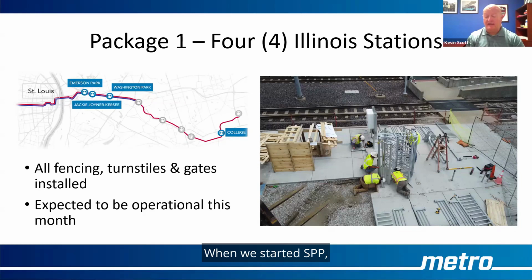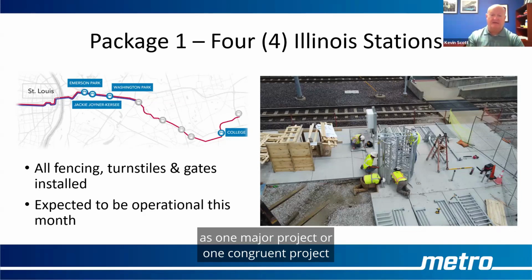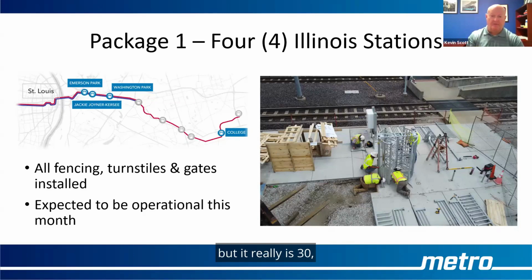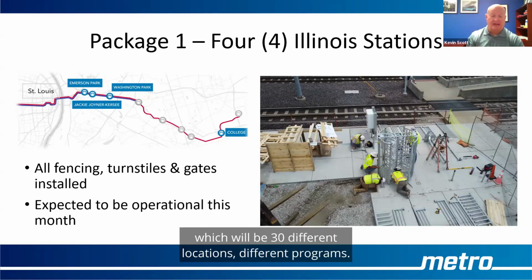When we started SPP, if we would have treated this in totality as one major project or one congruent project and had bid construction all at one time, it would have taken quite a long time to get through this process. We're titled under one project, SPP, but it really is 30 different locations, different programs. So we had to phase it, at least for the first couple of packages.